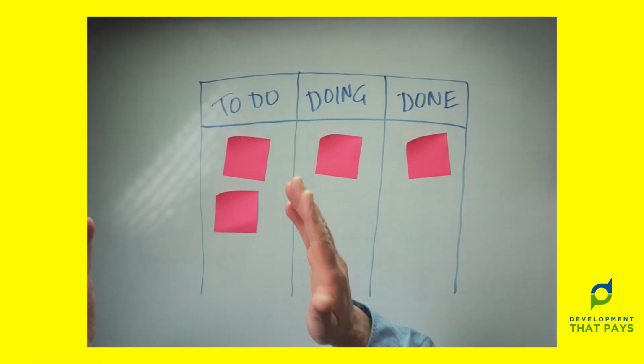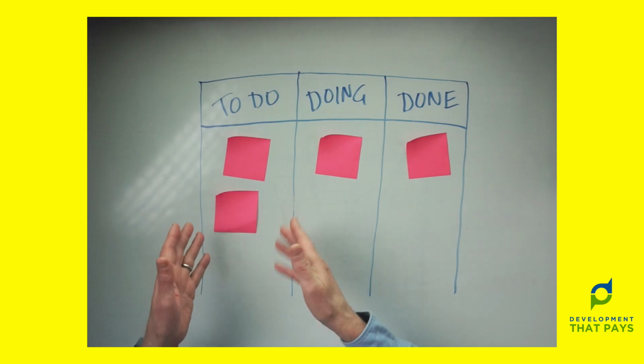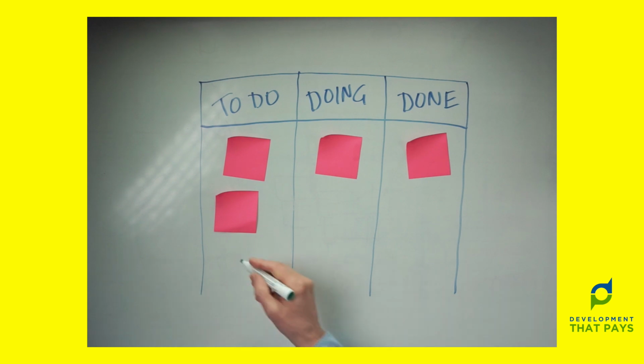Going back to the to-do column, as I said, Scrum teams have a sprint, they have sprint planning, they have a way of generating work for this column. In Kanban, things are a little different. In Kanban, the work pretty much drives everything, and we can enable that with another line on this board. This in Kanban is called a trigger point.